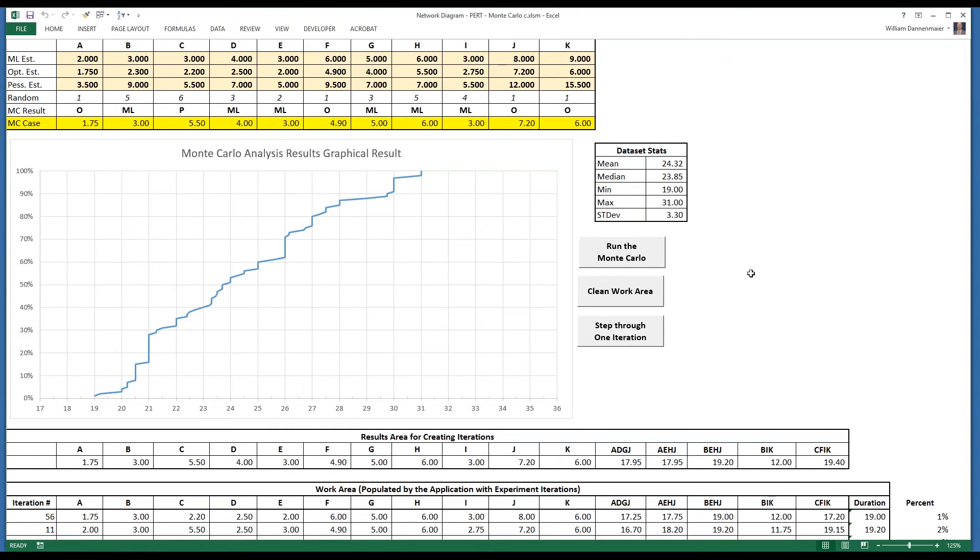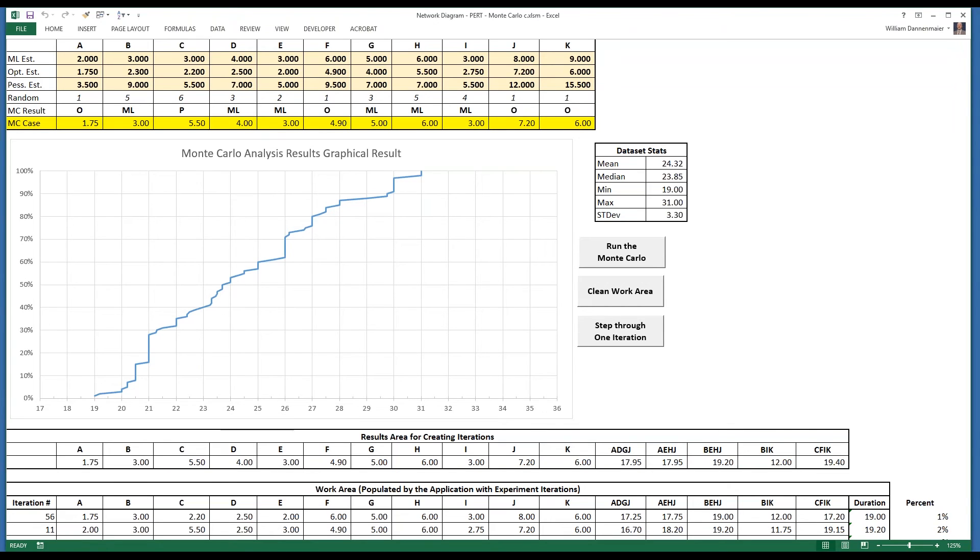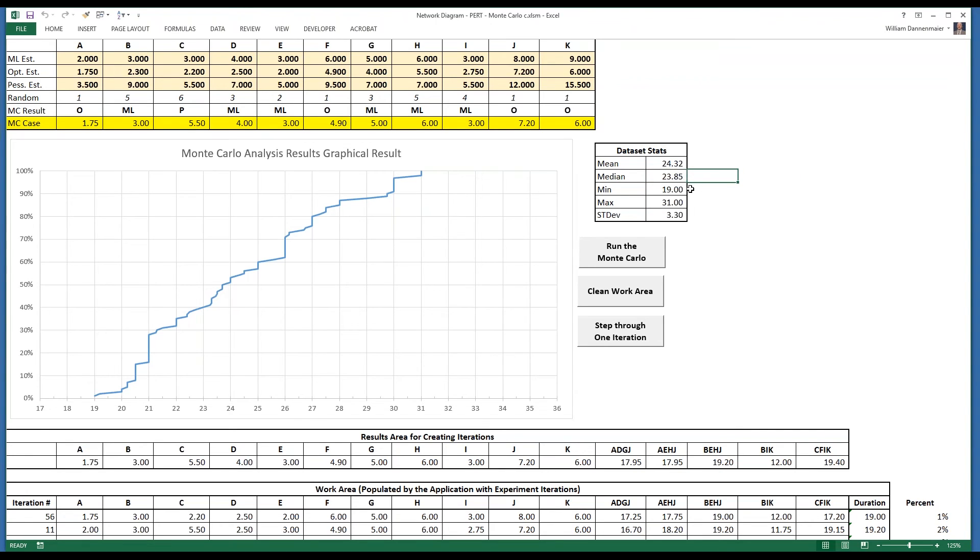It did not take very long because it's only 100 iterations, and we see here that the Monte Carlo has given us a small possibility, about 1% or 2% of a duration of 19 on this model, and a small possibility, 1% or 2% of a duration of 31. 50% likelihood is that it'll be 23.6 or so, which we can see in the median here, which is 23.85. The middlemost number is 23.85.